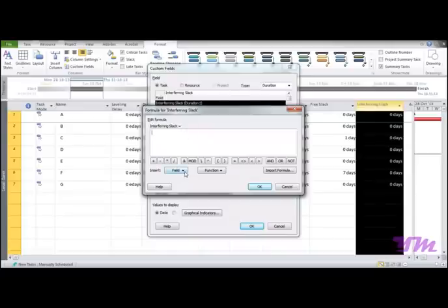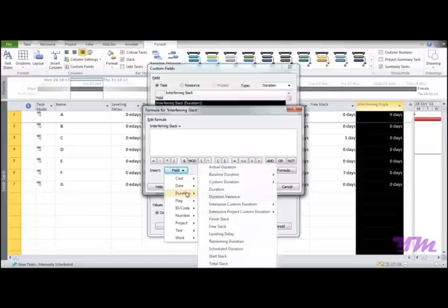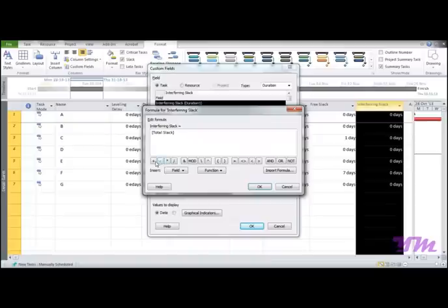Now we need to select the field. So our field is field duration, in which we have a total slack. As we discussed earlier, it is displayed in days, so it's a part of duration. So we went over to duration and we can find total slack. Select the type of mathematical operator you want. As per the formula of interfering slack, it's total slack minus free slack. So I would again go to field duration free slack and press OK.